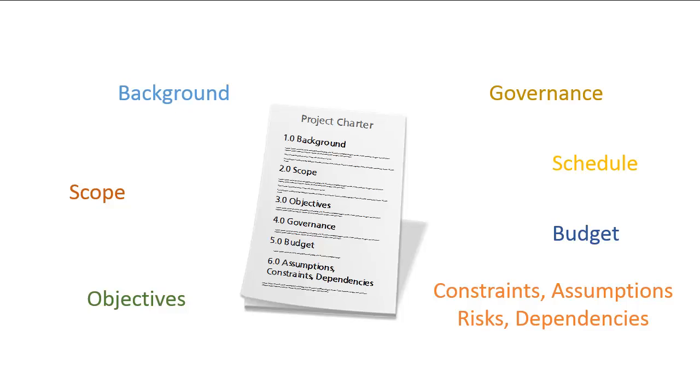An assumption is any condition or situation that you and your project team are relying on in order to achieve objectives. For example, your project may be building and delivering a custom module for your ERP system that promises to yield great increases to productivity over the next five years. The assumption is that your company will be using that ERP system for the next five years.